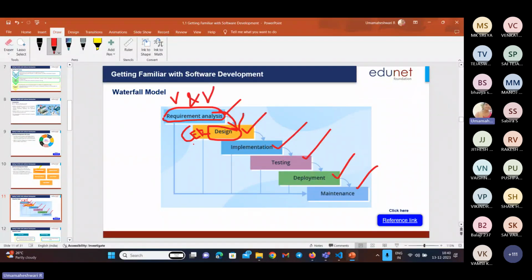So certification needs to be provided for each and every step. Once the design is completed, you can move on to the implementation part, and then testing, deployment and maintenance. You need to remember that for each and every step, completion is necessary, and verification, validation and certification are compulsory. Now we can see a real-time example of how we can process each of these.